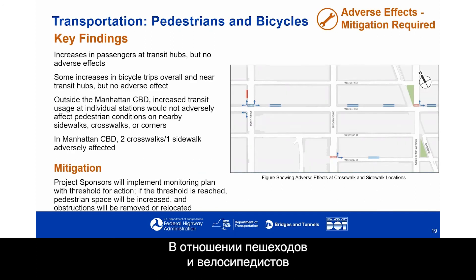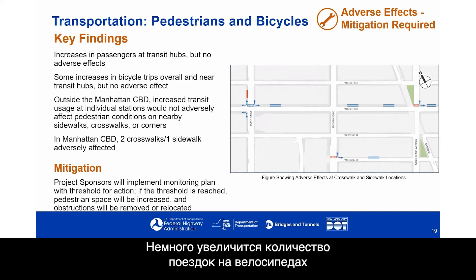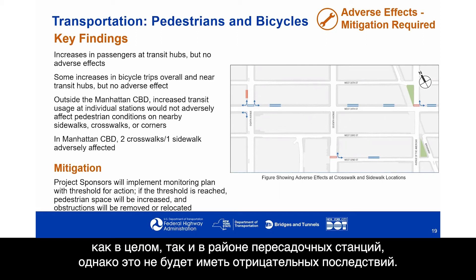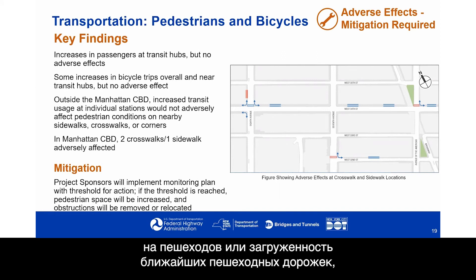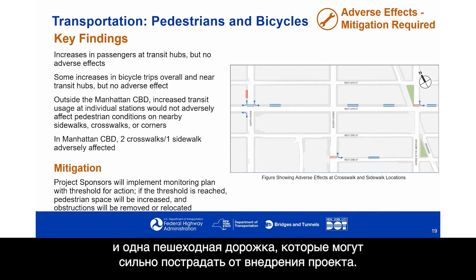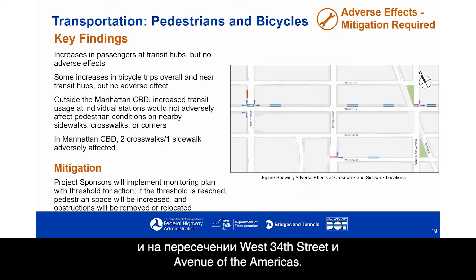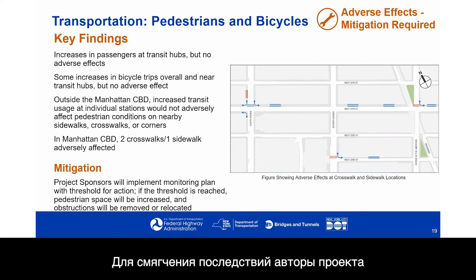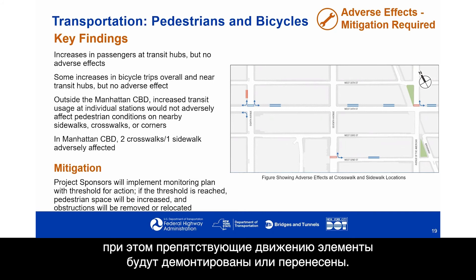With respect to pedestrians and bicycles, the EA found that increases in passengers at transit hubs would have no adverse effects. There would be some increases in bicycle trips overall and near transit hubs, but no adverse effects. Outside the Manhattan CBD, increased transit usage at individual stations would not adversely affect pedestrian conditions on nearby sidewalks, crosswalks, or corners. Within the Manhattan CBD, two crosswalks and one sidewalk would be adversely affected — on 8th Avenue near West 32nd Street, 7th Avenue, and West 34th Street and Avenue of the Americas. For mitigation, a monitoring plan will be implemented and if thresholds are reached, pedestrian space would be increased and obstructions removed or relocated.